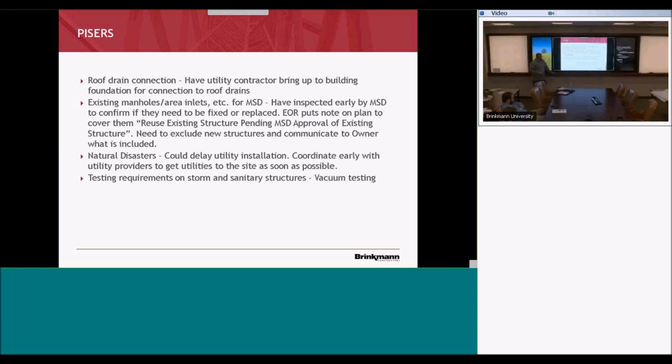Yeah, pretty much every utility agreement with owners disregards any type of delays. So there's really no recourse there. You can kick and scream, but utility companies normally don't really care. And I've never seen it work out good for you to get nasty or rude with a utility provider. That's probably going to hurt you more than it helps you.